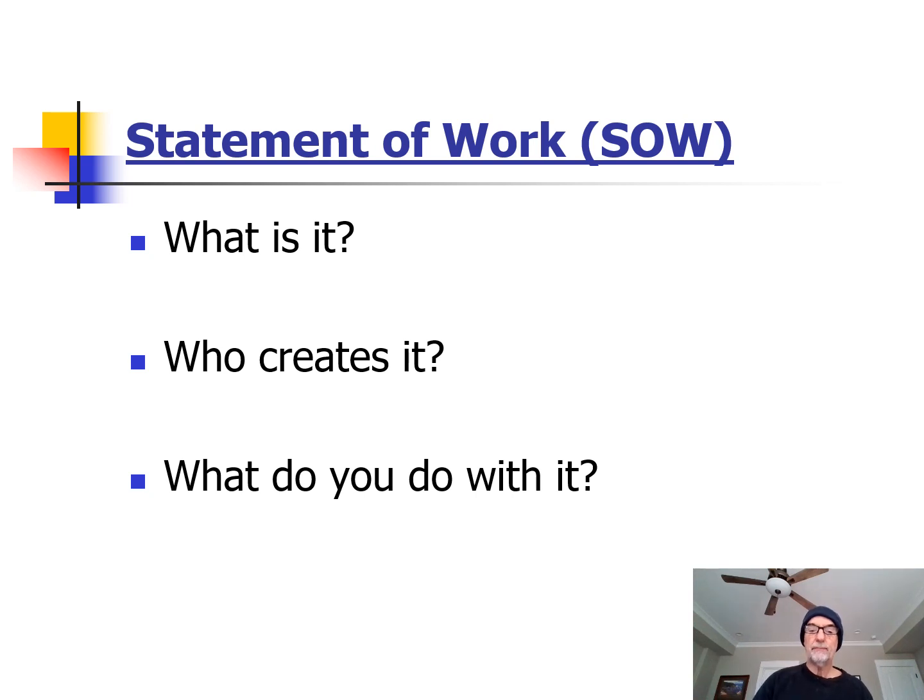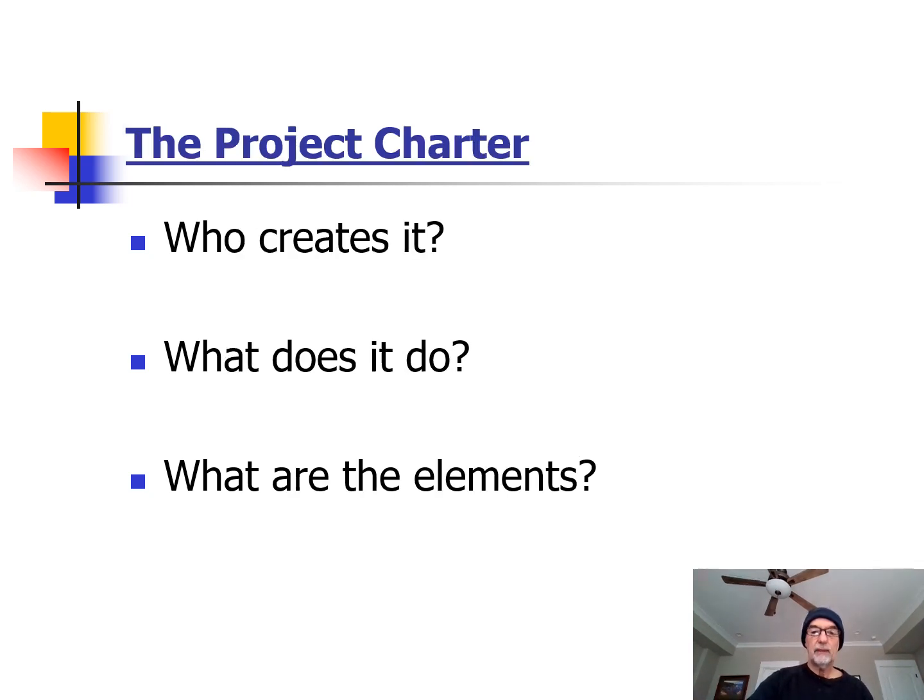What do you do with it? Good question. It's used to develop the project charter. So the statement of work is like a demand in economics, and then the project charter is a supply. So the project management firm creates it. What does it do? It authorizes the project. So it's game on.